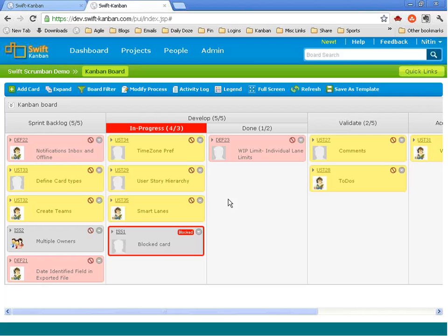For example, if you don't have clarity in the requirements and you just leave it between you and the product owner until the product owner comes back, you're stuck. You can identify this as a bottleneck with the entire team. It could be that someone else in the team knows about it and could help you out, right? The whole purpose is to identify such bottlenecks and work collaboratively with the team to resolve it.